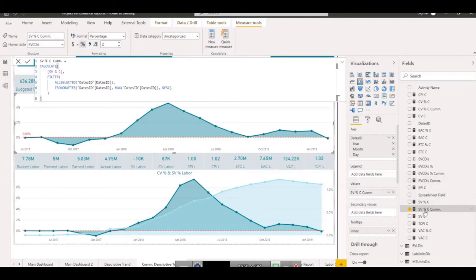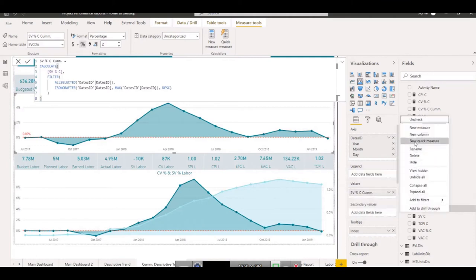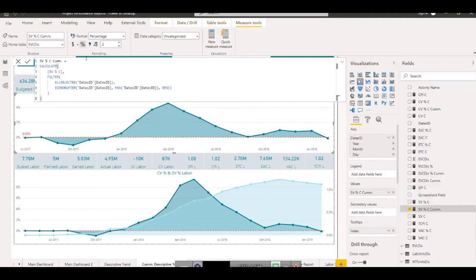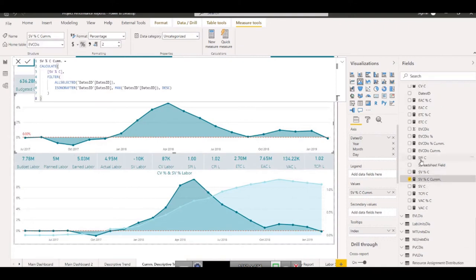Run this, and for example go into the quick measure, and against time period you can do that. I have done it from there as well, from the quick measures. So you can develop it. You cannot do the cumulative for SPI, because cumulative would mean adding 0.1, 0.2, and it might go on to more than 10, so you don't need it. SPI is an index, it's a ratio, so it cannot have cumulative values. So it's fine so far.